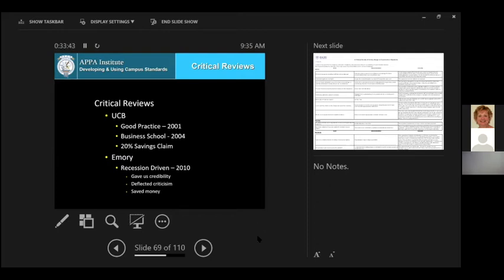And the only way we're willing to accept that is if we route those work orders to your office and you take care of those hot and cold calls. Otherwise, we are not willing to take that additional burden on. So in the end, we only ended up accepting 3% of the recommendations from the developer because of the implications of what would happen in the future. And sure enough, the project came in 20% over the budget because the dean had cut the budget by 20%. So that pretty well satisfied the dean that we actually had a decent set of standards to begin with.